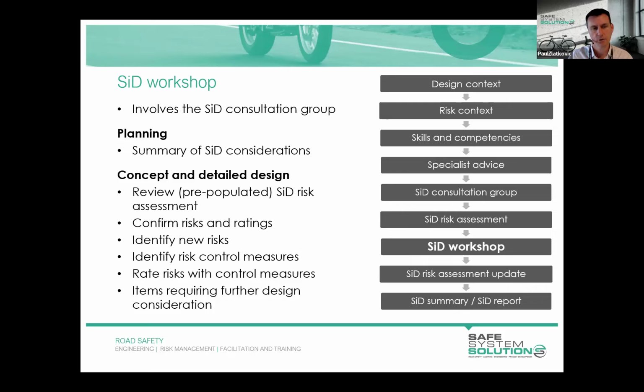We'll bring the safety and design consultation group together to review that pre-populated risk assessment, confirm the risks and the risk ratings, and identify any new risks.